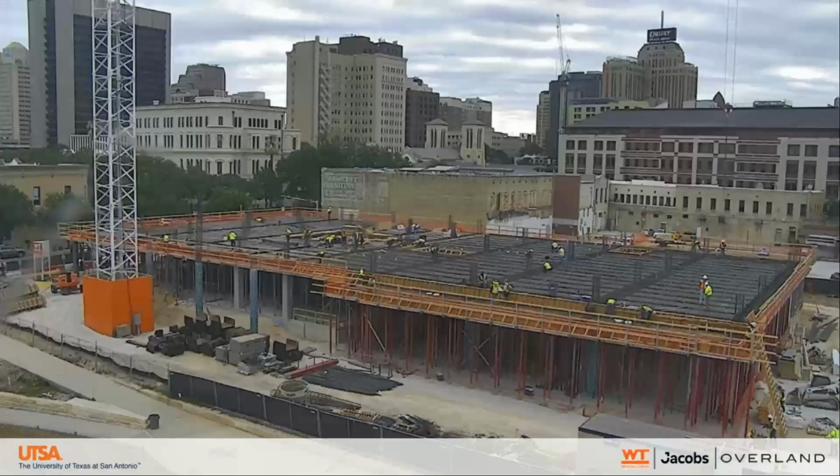I think the excitement here is we started this project about in June of 2020, and we were able to break ground in early December of 2020 and issue final construction documents just recently, this past month. So we're really happy to tell the success story of this during this time period.